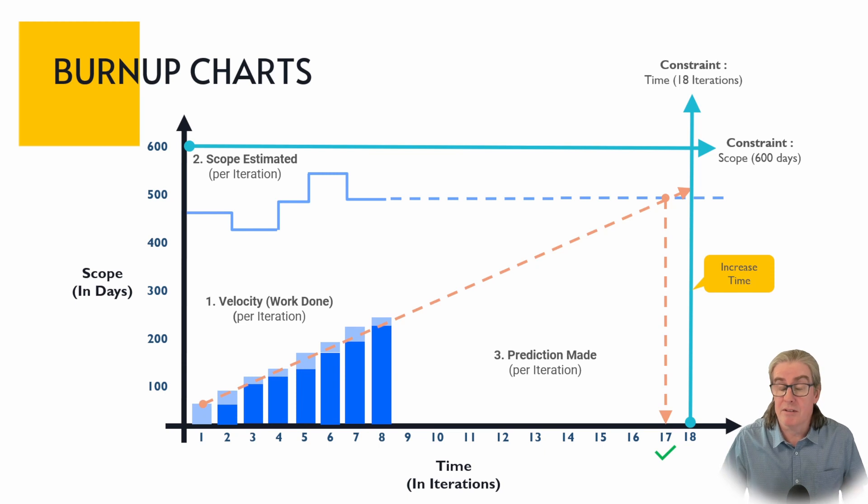Now the other thing that happens and typically this happens a lot is that the scope might not be able to be changed. The velocity, maybe there's not much more you can do with it. There's no more people that you can add and you've already tightened all your processes. So what can you do? Well you can push out time. So here we're saying that we're going to move out into iteration 18. And you're going to give it an extra month. And because of that, it looks like you're now going to be able to hit your dates.